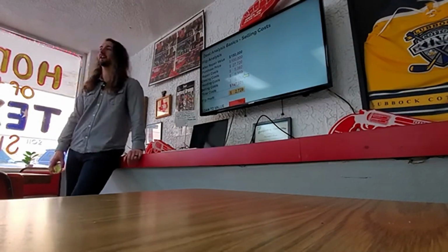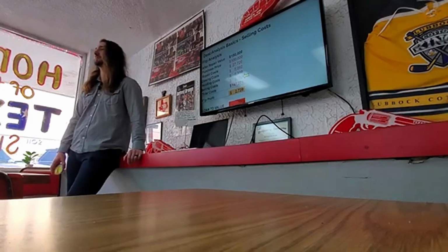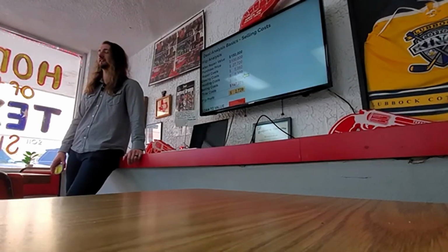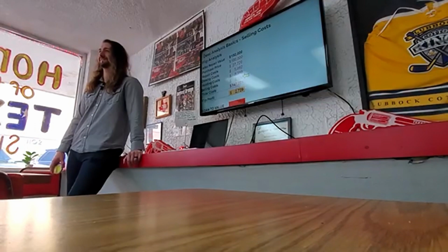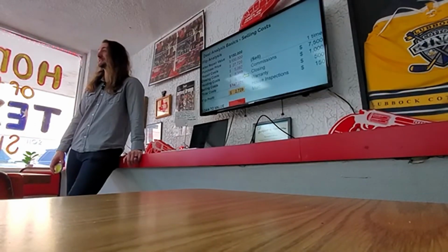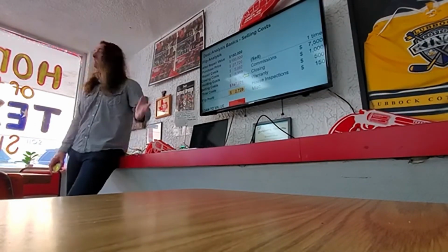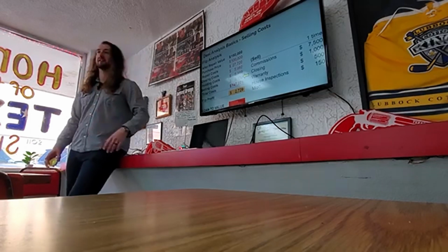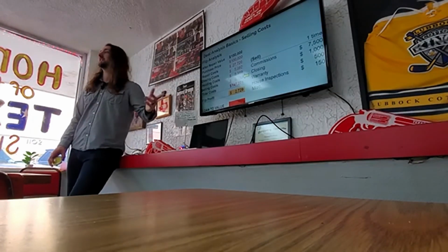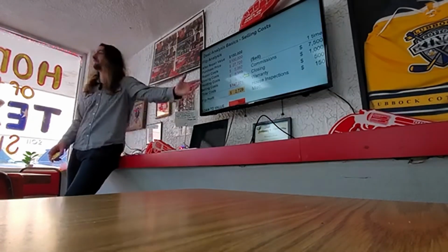And your last hidden cost, selling costs. Who could tell me one thing that goes into the selling costs? Realtors. That's the biggest one. 7,500 commission, that's 5%. You've got some closing costs on the backside of it, warranty, and then another re-inspection. And you could have miscellaneous.